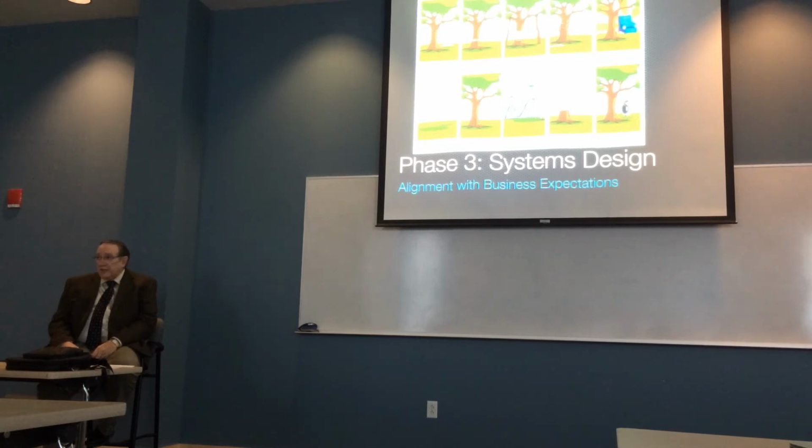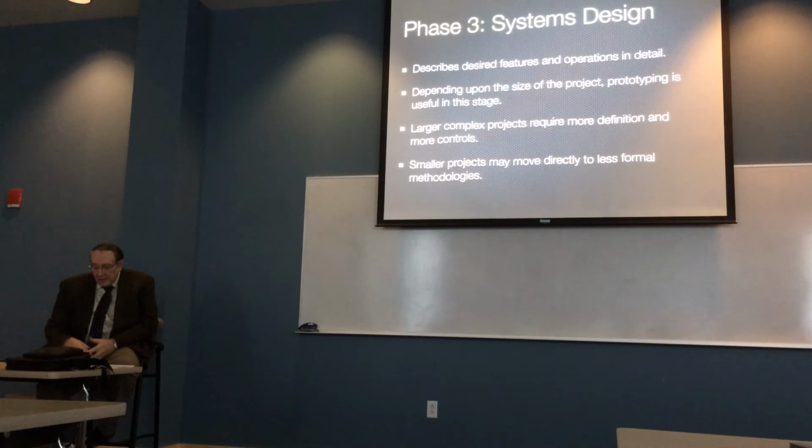And it's something we ought to seriously consider, because you remember how we encouraged you for years to make sure your dev environment, your test, and your production environment are pretty similar, because otherwise you're going to get burned. Fidelity has been working around this issue, having been burned, I might add, really badly, a time or two, and doing large vertical slices for prototypes. As a customer, prototypes are one of my favorite things, because then I can find out if you really got it, or if I'm going to get something with the tire swing through the middle of the tree. So use prototyping, it's your friend. Don't kill yourself with it, but it's a wonderful way to get customer concurrence. So systems design.